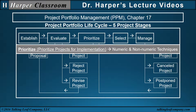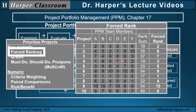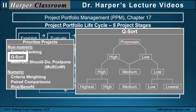The prioritize stage. Prioritize projects for implementation where the projects that have been placed in each group in the evaluate stage are prioritized based on numeric or non-numeric techniques that use quantitative data or qualitative information. Wysocki identifies three non-numeric techniques and three numeric techniques. The forced rank technique: each project portfolio management team member ranks each of the projects. The ranks are summed, and then the sums are ranked — that's a forced ranking. The Q-sort takes all the proposals, divides them into two groups, high and low, and then divides each group into two, and then each of those is divided and they continue on until they have the lowest division desired.